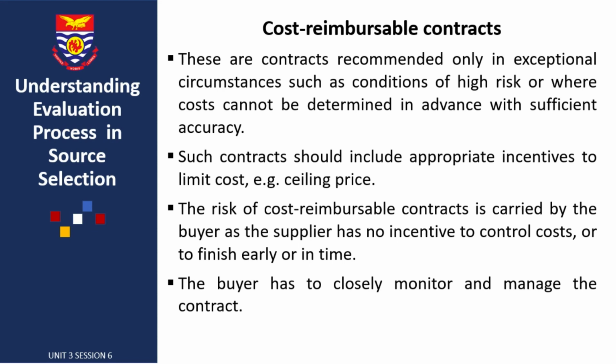The risk of cost reimbursable contracts is carried by the buyer, as the supplier has no incentive to control cost or to finish early or on time. So the buyer has to closely monitor and manage the contracts. The supplier just counts for his or her money when he or she finishes.